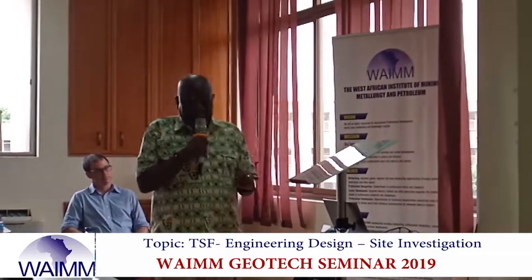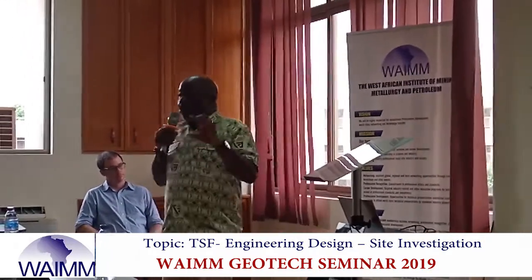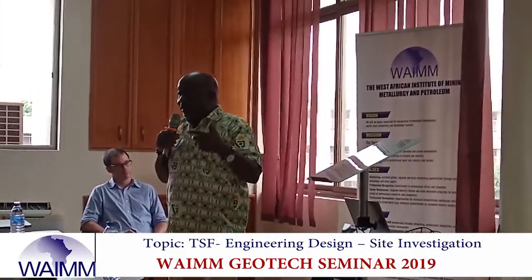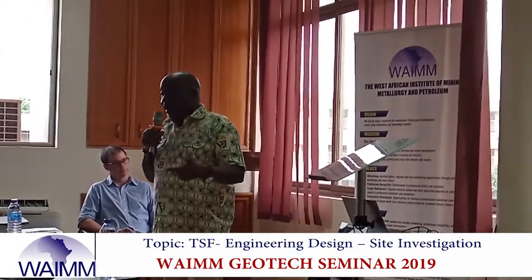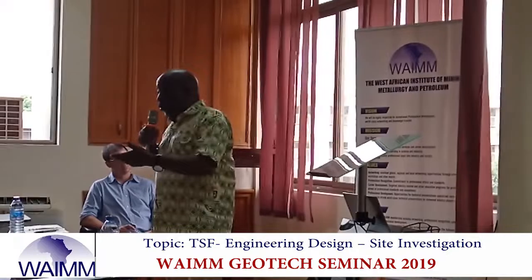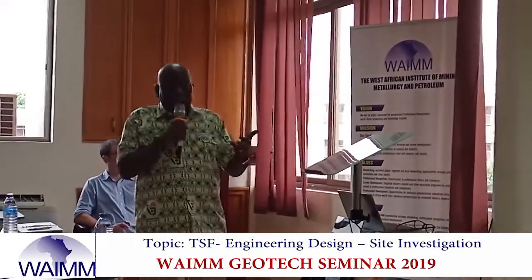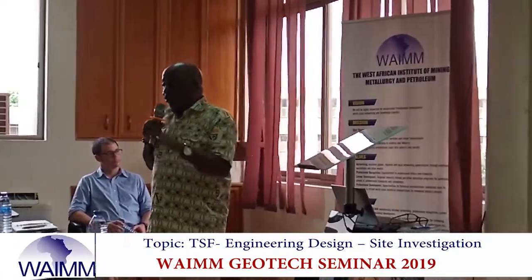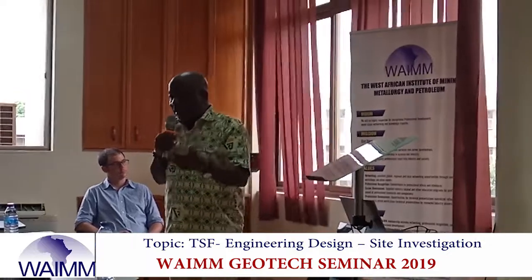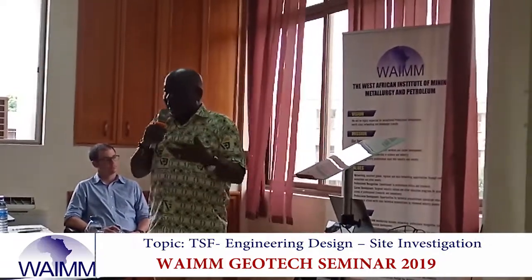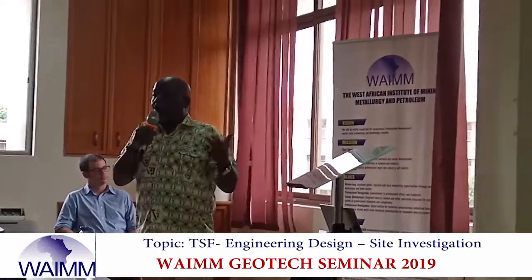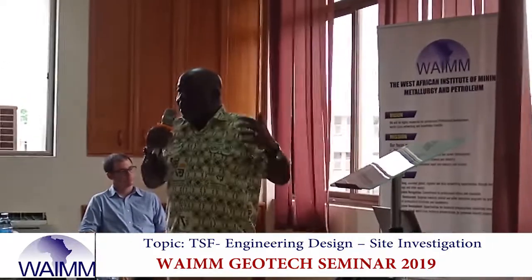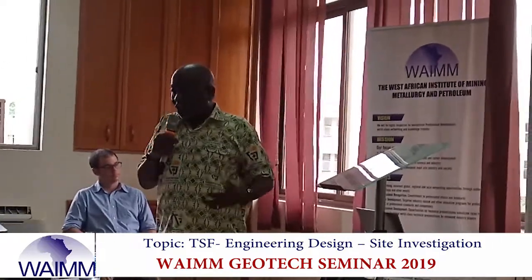Then in the initial design studies, the information is to obtain regulatory approval, refine cost estimates, and then develop engineering and environmental data. In the initial design stages, this is the information you are going to put into your scoping report, the geotechnical information. So you need to get more detailed information on your soil profile. You can get that from geological data, from trial pitting, from preliminary auger boring or dynamic cone penetrometer tests. You can get preliminary data for the initial design of your TSF.